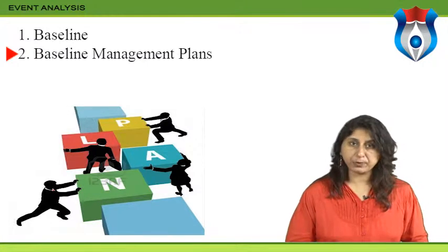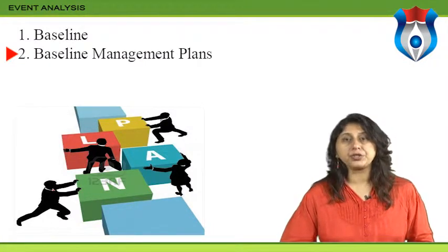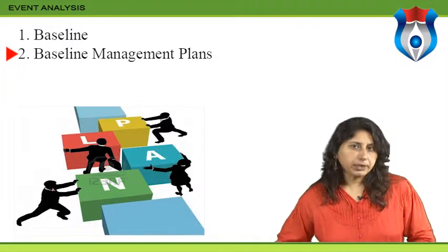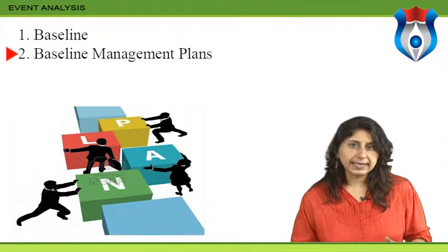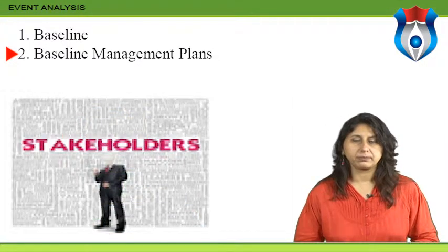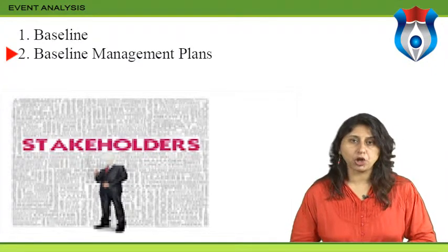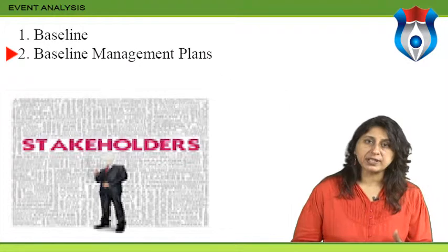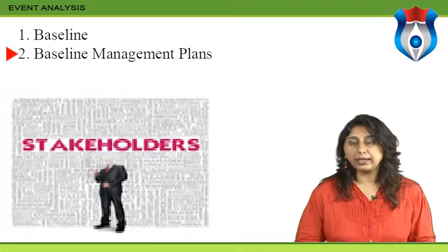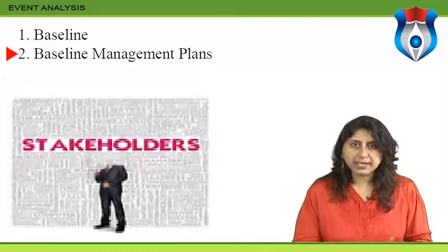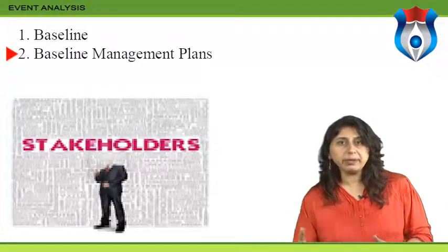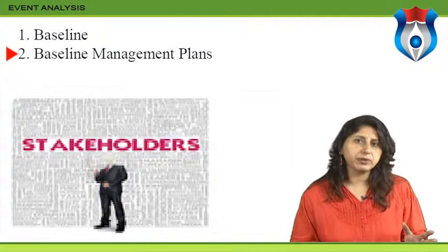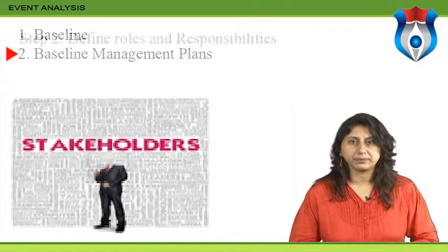A result of this process may include the need to do additional planning, with the possibility that the baseline will change. Project management plans document what the project team will do when variances to the baseline occur, including what process will be followed, who will be notified, how the changes will be funded, etc.